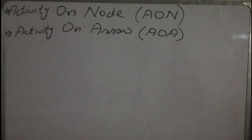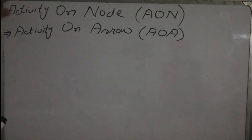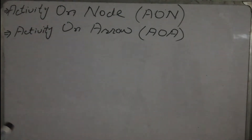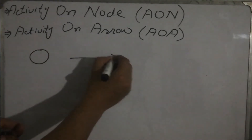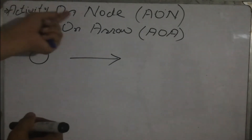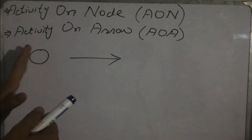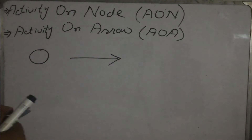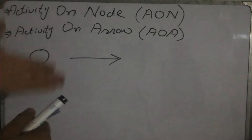There are two techniques we can use to draw a network diagram. The first is the Activity on Node technique, where the activity is represented by the node. The second is the Activity on Arrow technique, where the arrow represents the activity. In Activity on Node, the node marks the start and end of the activity, while in Activity on Arrow, the tail is the start and the arrowhead is the end.